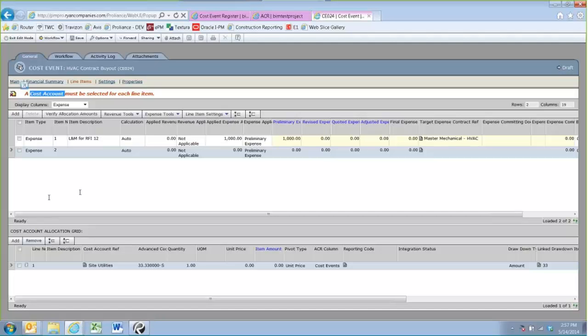The other thing is Proliance does have a timeout issue. So it'll let you keep adding line items without ever saving, and it'll let you do this all day long if you wanted to. The problem is Proliance itself will time out. I believe it's after about a half hour, 45 minutes, which means if you're doing 20, 30, 40 line items and you're putting a lot of detail in as you go, the system could time out from the last time you hit save. We've had this once or twice happen to people, and there's no way we can recover it. If you hit save, it restarts the clock on that timeout. So anytime you do an action, you're okay. But if you're not saving regularly, you're not doing an action that's resetting that timeout clock.